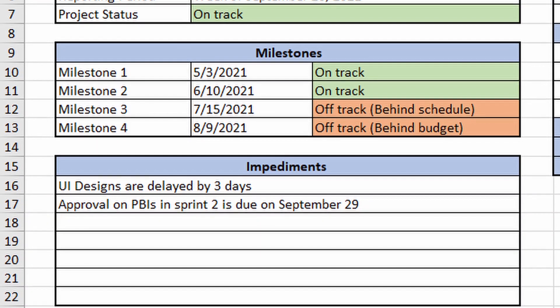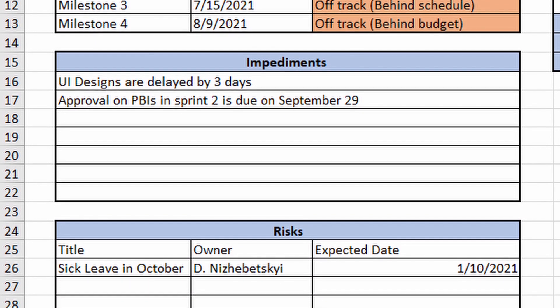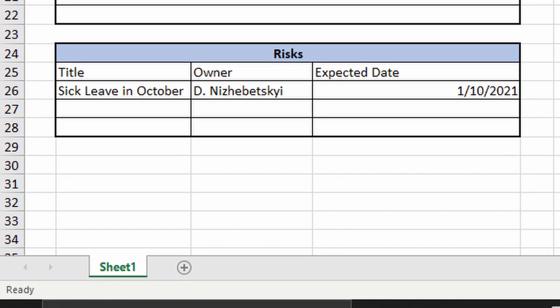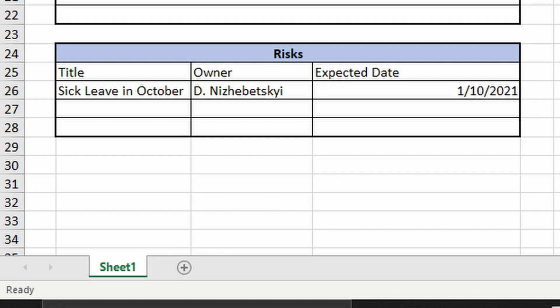The next section is impediments — events or blockers that reduce your efficiency in implementing the deliverables in your plan. These should be discussed on a daily or weekly basis and resolved as soon as possible. You simply put all the problems you have on the project here. The next section is dedicated to risks, taken from your risk register. You usually want to highlight ongoing risks and those coming soon. Ideally, copy-paste information from your risk register, and if you keep it in Excel, it will be effortless.